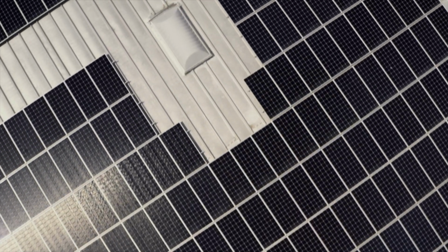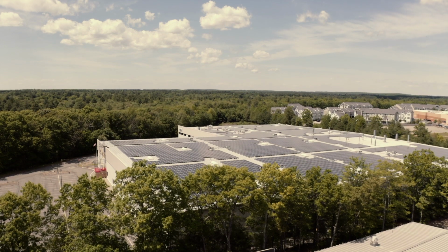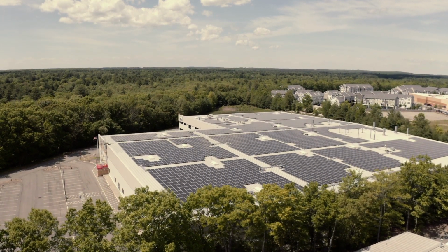The rooftop systems are especially challenging because you want to make sure that they're connected properly to the roof and also to the electrical system. In some cases, they want particular equipment. They're looking for a particular output to offset what their building is consuming from the utility, and we will assess what we can do. Or once we've estimated the cost to construct the system, we can match that up with production model estimates. We can model in incentive program characteristics and values, and then determine what the available lease rate is for the available roof space.